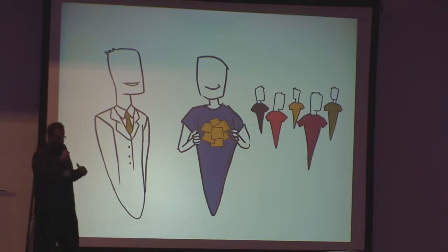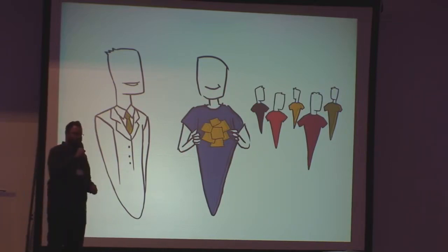So first is the product owner. This is a single individual. This is the representative, sort of could be from the business side. This is the person who's responsible for the product and making sure the product is valuable. So they're responsible for grooming that product backlog, making sure that the right work is identified, and that the most valuable work is the highest priority.